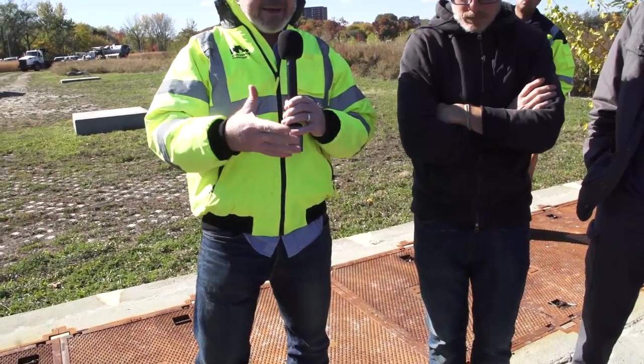groundwater issues. So we do expect to see some groundwater impacts due to some of the work that is planned. Not necessarily the work that we're doing, but the work that's planned in the canal, namely the in-situ soil stabilization, as well as the cutoff wall the National Grid has to construct for the upland MGP remediation work. And Gowanus Canal is the low point, so the groundwater flows down towards the canal, and those two items are going to restrict that groundwater flow and then could cause some mounding of groundwater upland. So that's a conversation that we've been having recently.